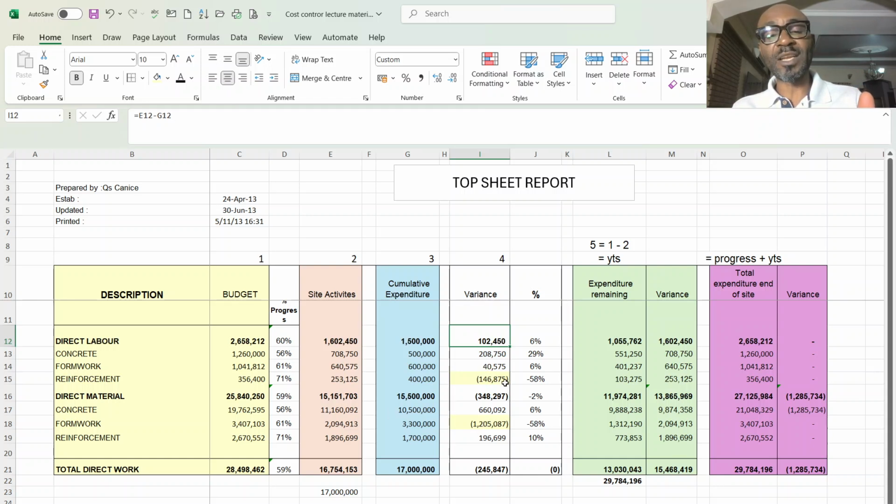But why it's always very good for you to analyze each item in the bill is for you to know where you're actually having problems, so that you can trace to know if it is based on negligence or it is actual loss. If it is actual loss, either the labor cost has increased, because you budgeted, say, per ton 120 and eventually you are doing it at 150, which is explainable, or the labor cost is still the same, but you are still having loss.